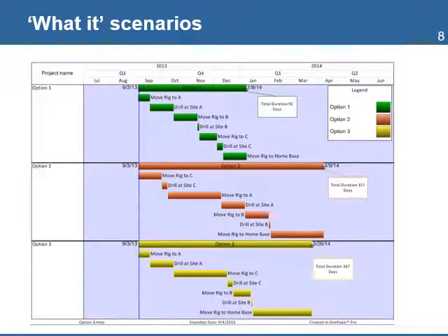What-if scenario analysis. This is a method that compares and measures the effects of different scenarios on the project. The use of simulation helps determine the effects of various conditions, such as resources not being available on time or delays in other areas of the project. You can develop various scenarios to determine which one will result in a shorter time to complete the project. This can be done with scheduling software such as Microsoft Project.